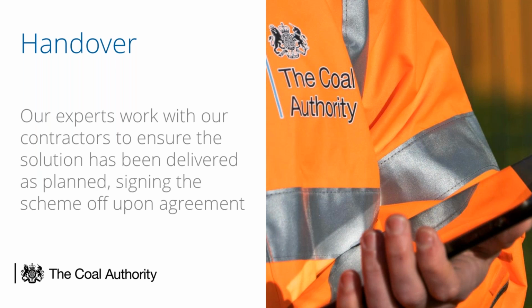From a handover point of view, it starts off with walkovers, site inductions, so the construction team will take the operators and ourselves as operating managers around the scheme, looking at what the scheme is, looking at how the scheme operates, anything that's of a site-specific nature, training on operations of panels and equipment, etc.